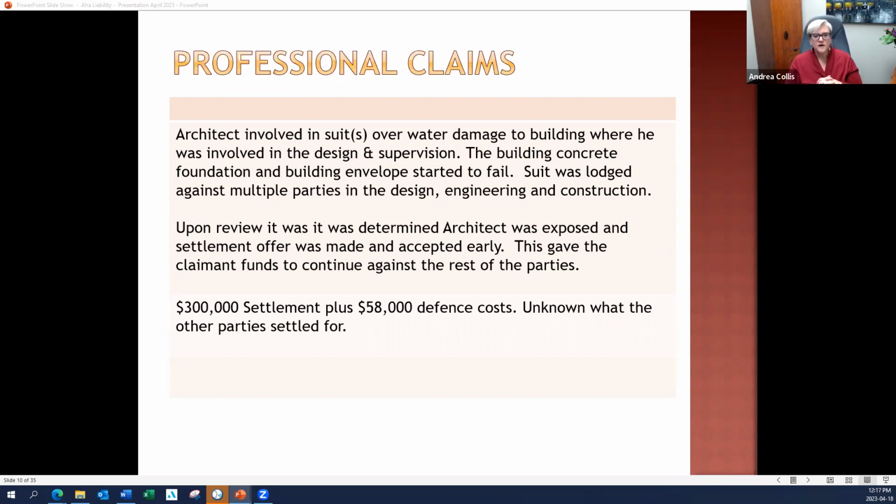In this case, the client contracted restricted claims that their clients could bring to them to the cost of their fees and the hardware only, which significantly assisted in getting the claim resolved quickly. In this case, a $500,000 demand letter was received. However, the client felt that their client knew behind the scenes owed lots of money to the IT firm. So the client felt that this claim was brought in order to avoid paying a bunch of outstanding fees to them.